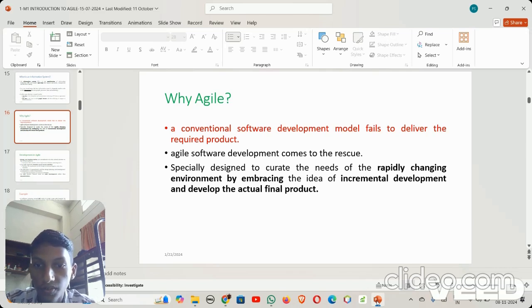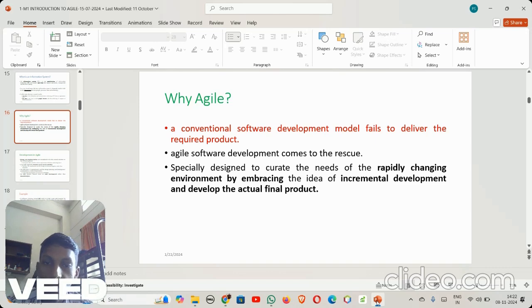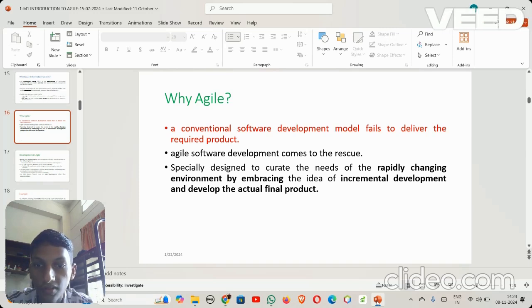Next one is the sprint. During the sprint, the team works on completing the tasks in the backlog, that means whatever was planned in the sprint before. They may also come across new issues to address. If this happens, they will add these issues to the product backlog and prioritize them accordingly. At the end of the sprint, the development team should have completed all features in the sprint backlog. If not, the team will carry them over to the next sprint.